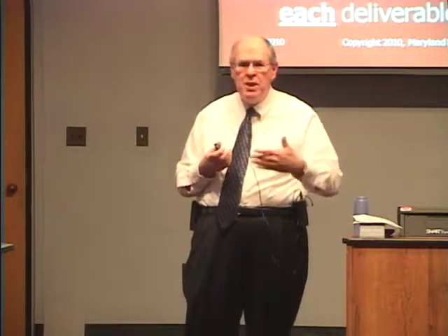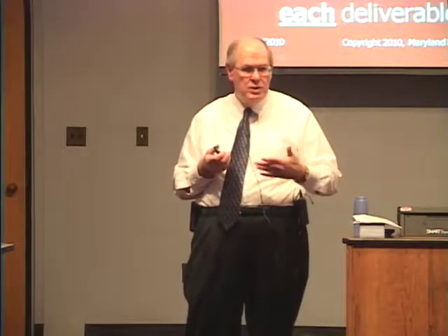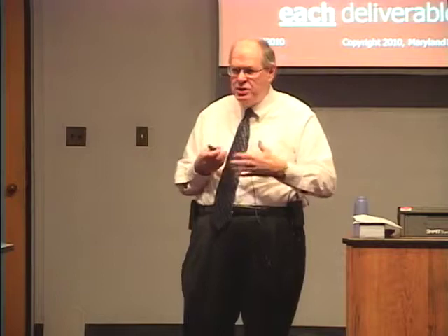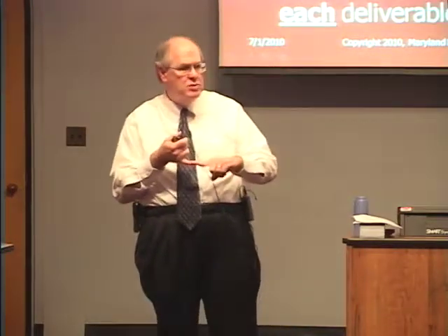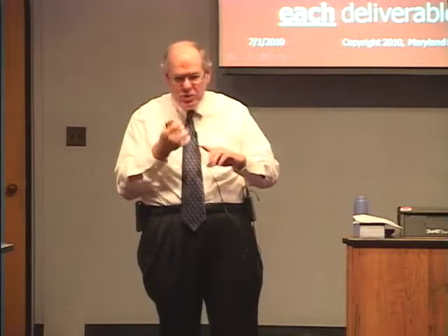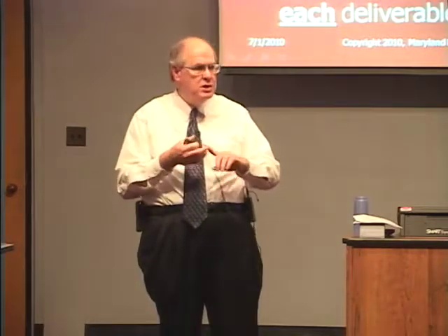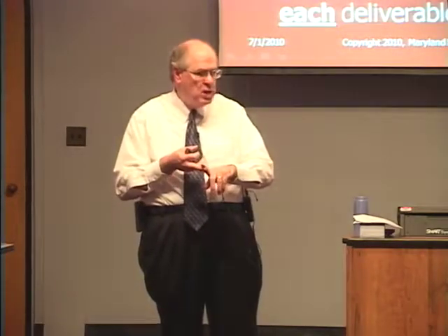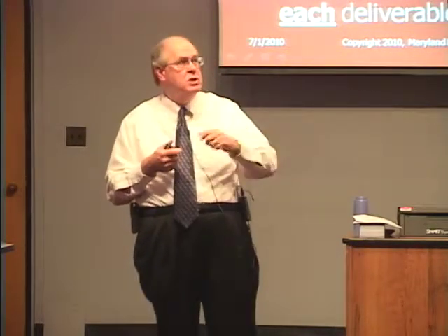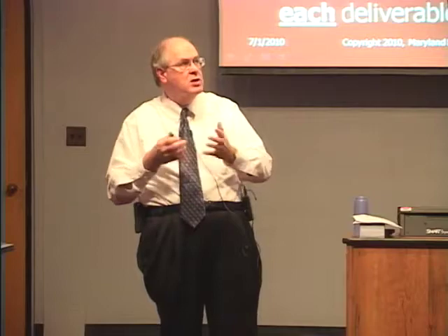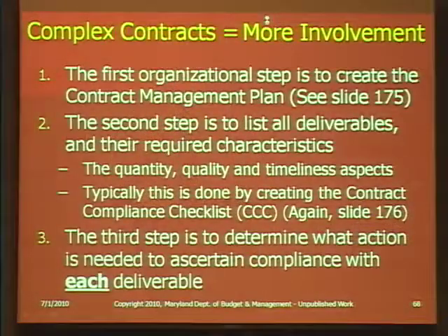How are you going to manage the contract? That is the contract management plan. It starts off with, in advance, certain elements involved in the contract management. And then as you go through the procurement, it may change. And then once the contract is awarded, everything that happens should be in this contract management plan and contract management file.